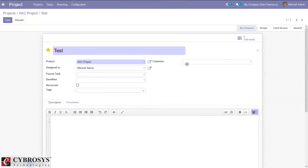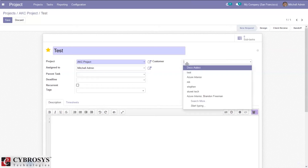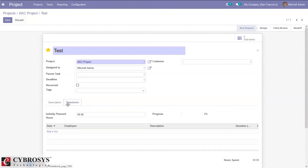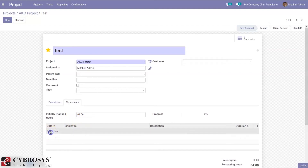If a task is done specifically for a customer, you can set that customer here. We can also provide a short description for the task. Then here comes the role of timesheet — we can add the time spent by employees on this task. If you planned four hours for this task, you set four hours, and here you can add the actual time spent by employees.